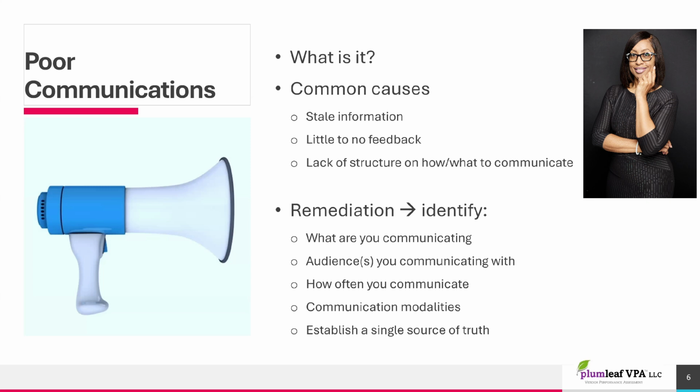And the last thing I want to say about this, and this is key, establish a single source of truth. If you're storing your information and your documents somewhere on your drive, and then some of the other project team is saying, oh, I'm going to store my information on Confluence. Oh, no, well, I put mine on the network drive.